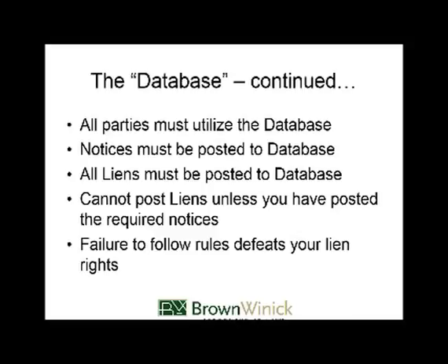So what are the new requirements? Well, now all parties must use that database. This is not something that you can opt out of. It is mandatory. You must use the database. All of the notices we'll talk about here must be posted to the database. All liens must be posted to the database. And you can't post a lien unless you've posted the required notices. We'll walk through that in detail in a second.